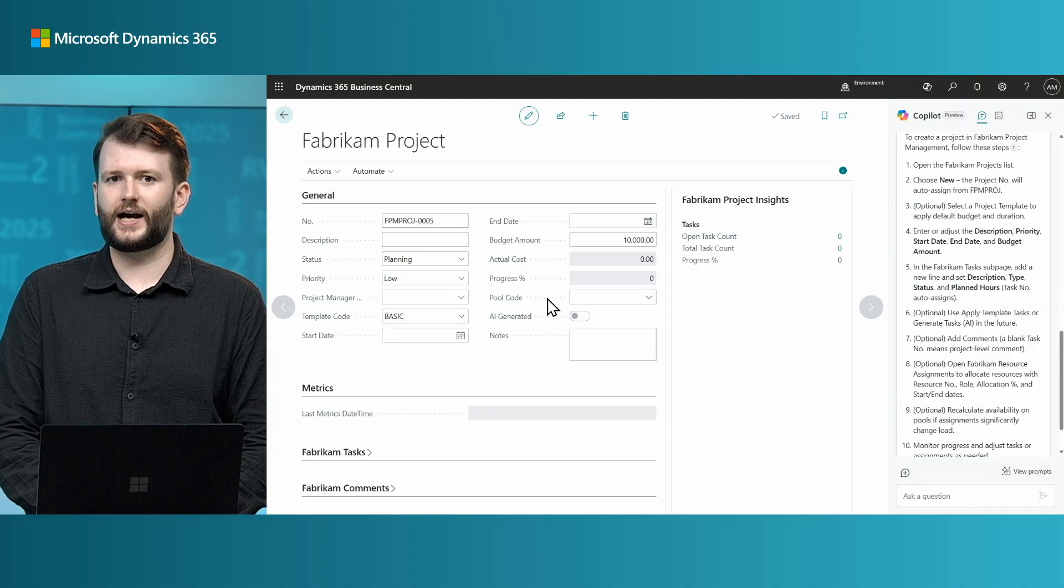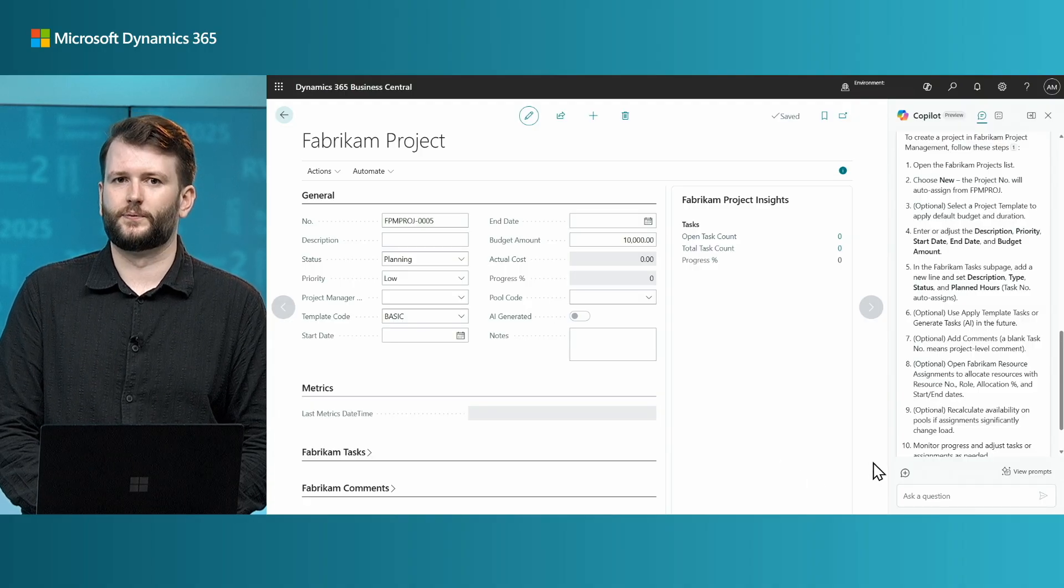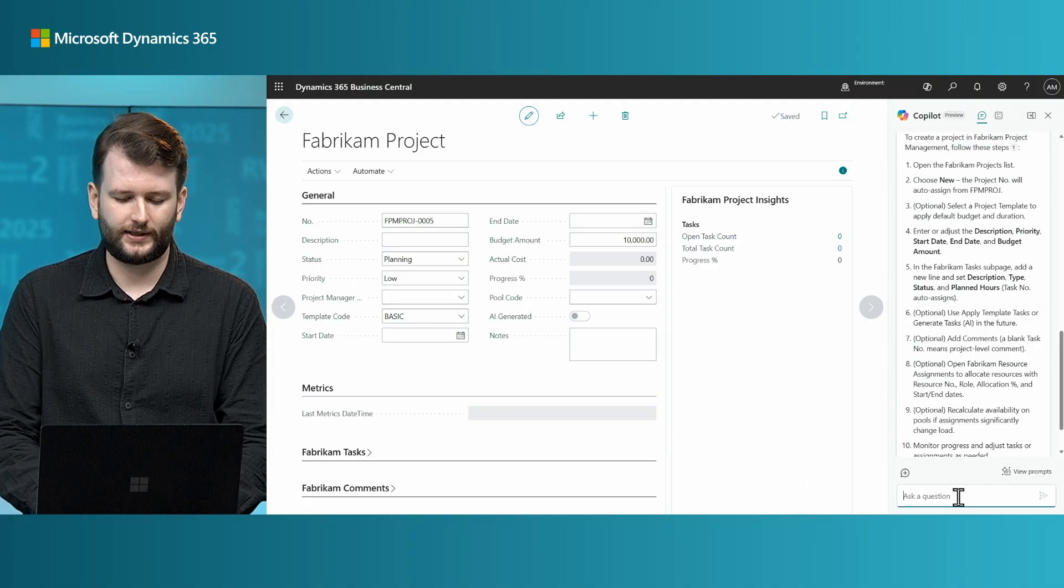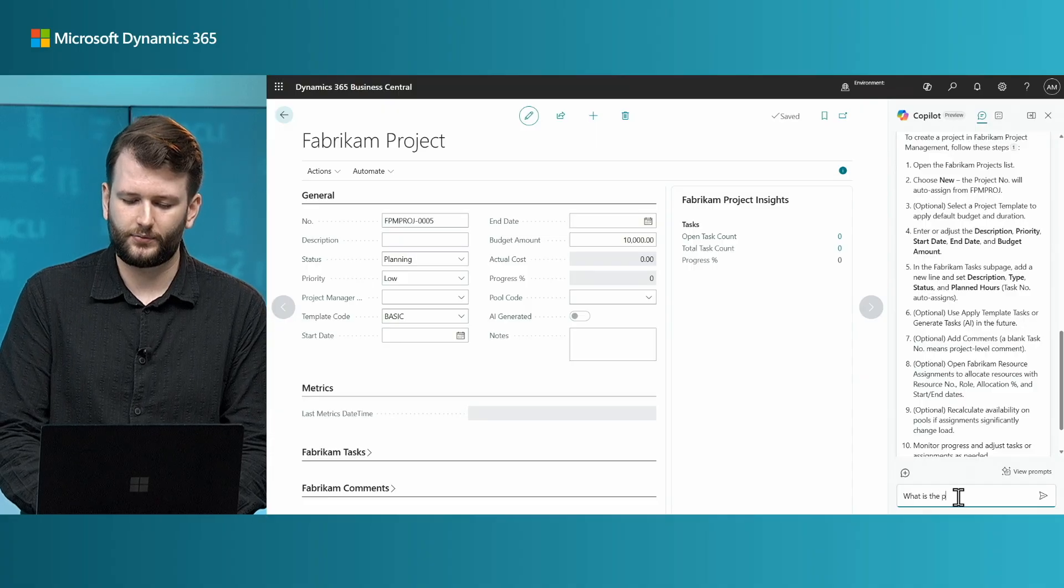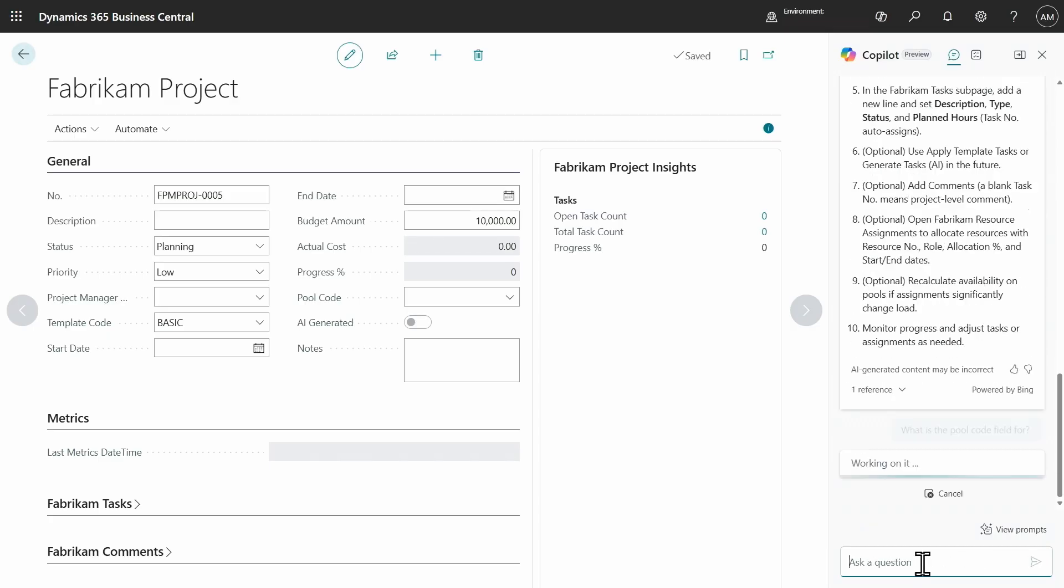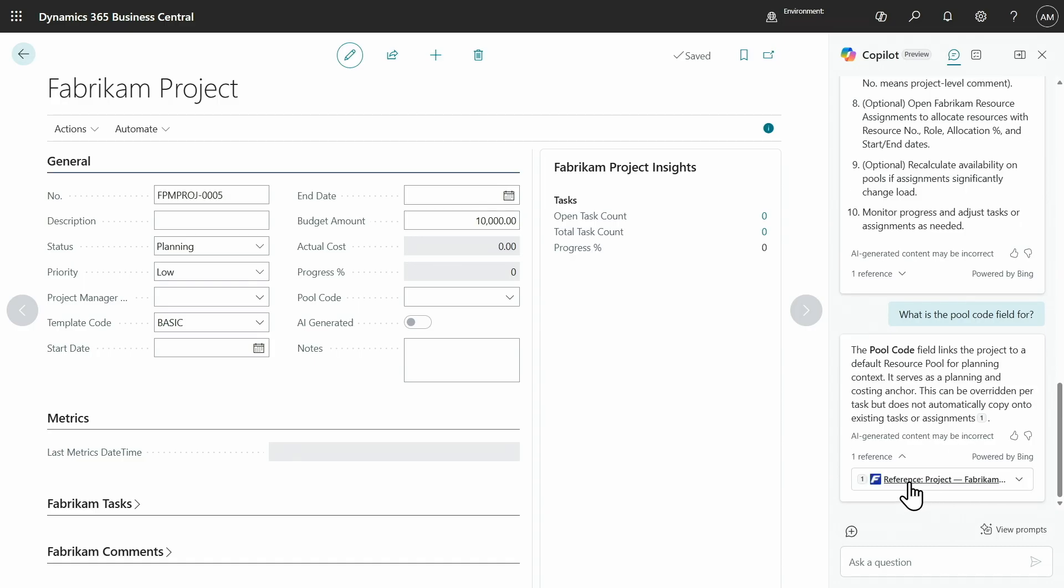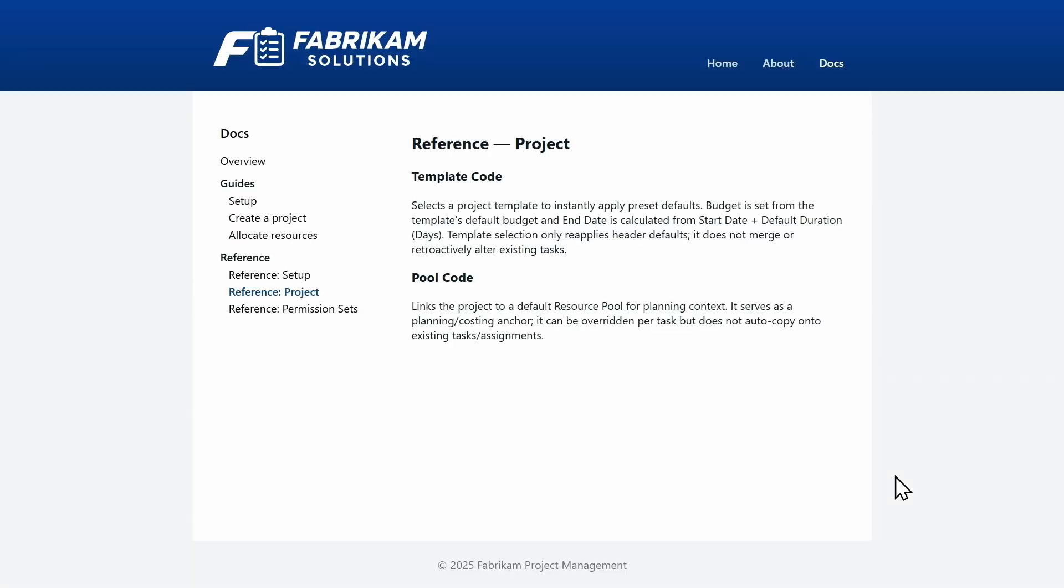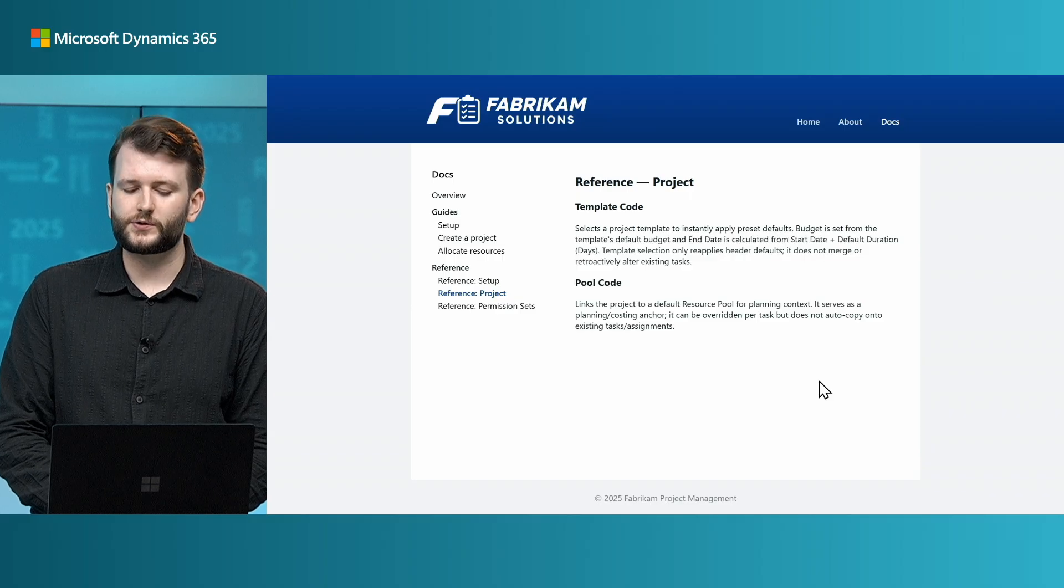And I would continue to fill out these fields until I get stuck on pool code. What does pool code mean? But I can ask Copilot chat this question too. So, now let's ask, what is the pool code field for? So, we can see the answer here. The pool code field links the project to a default resource pool for a planning context. And if I click through to this page, I can see the app's reference content, which gives more detailed information about how different fields work.